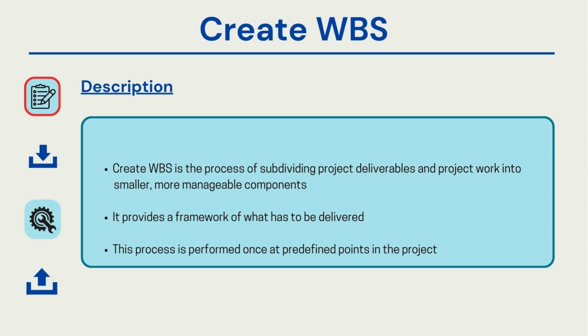Most importantly, WBS helps identify dependencies, create schedules, and estimate costs and resources. Each work package created must be broken down to a level where it is easy to estimate. It should not be a large chunk of requirements but rather small, manageable components. For example, if you are working on hardware, it should be broken down into smaller components and deliverables, making it easier to estimate networking requirements, hardware requirements, server needs, and middleware necessary for building the system.